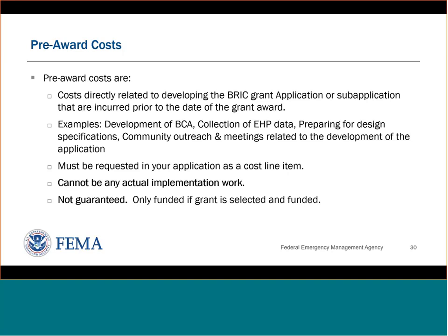Now, what you cannot do is break any ground. If your project has any sort of construction involved, do not put a shovel in the dirt until you get your grant award, because any costs that you incurred doing that in the pre-award period are not eligible. And one other thing to note is that pre-award costs are not guaranteed. They are only funded if your project and sub-application is selected and funded. Next slide, please.